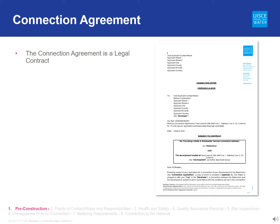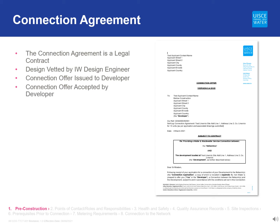Before the pre-construction meeting takes place, the design must be vetted and accepted by Irish Water. The developer must receive a connection offer from Irish Water, must have signed and returned the connection agreement and made full payment including any specified self-lay surety. Any required arterial easements referred to in the special conditions section of the connection offer should be provided to Irish Water. Arterial easements are required where a development is connecting to the Irish Water networks by way of infrastructure not owned by or vested in Irish Water, referred to as arterial pipes. These should be provided as part of the acceptance criteria for the connection offer to avoid delays in connections to the networks at a later stage.